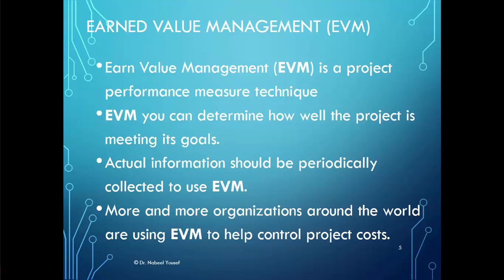Given the original plan plus approved changes, or what's called a baseline, earned value management can determine how well the project is meeting its goals. Actual information must be documented periodically to be able to use earned value management, and in many organizations they depend on that value to manage and control their projects.